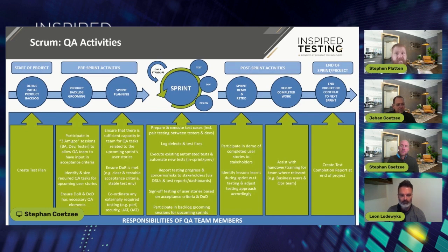I'm not saying we can't do more testing. I'm not saying I get complete coverage, but as a bare minimum, that gives you information to make an informed decision. And I think that 30 question comes to, do the 70 of those automated tests give the business enough information to make an informed decision about the quality of that product? If it doesn't, you'll need to do some manual tests. If it does, great. That's how I would look at it.